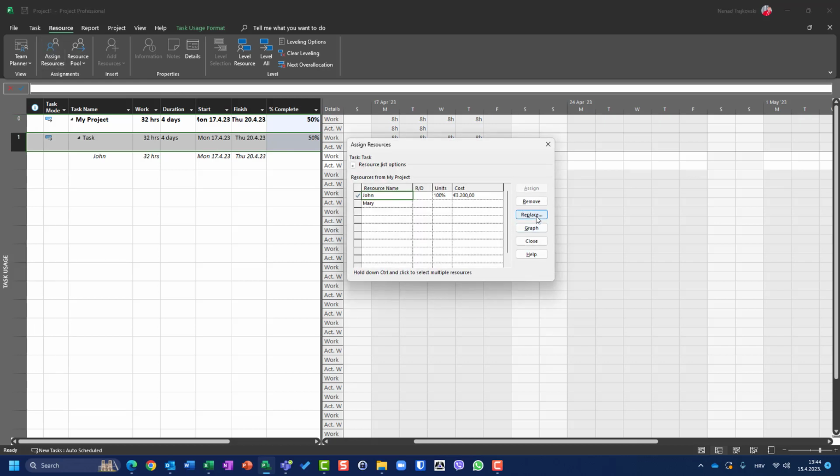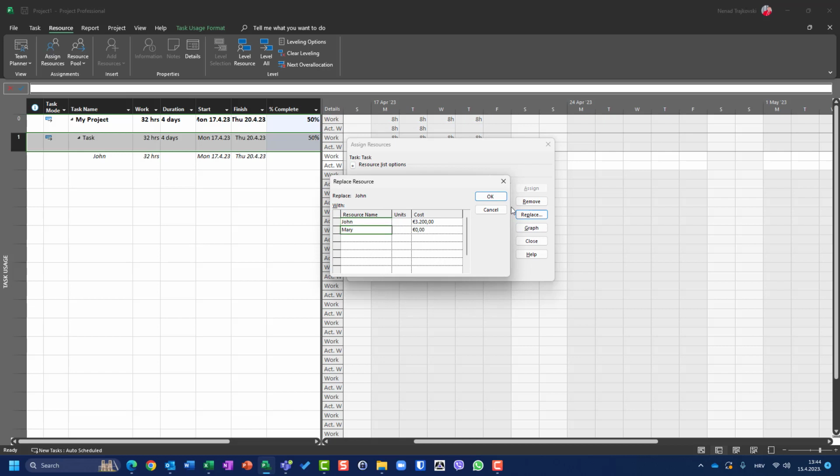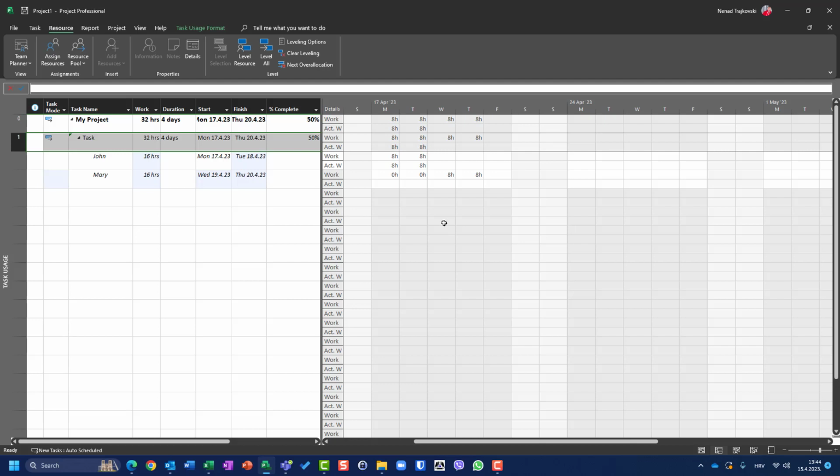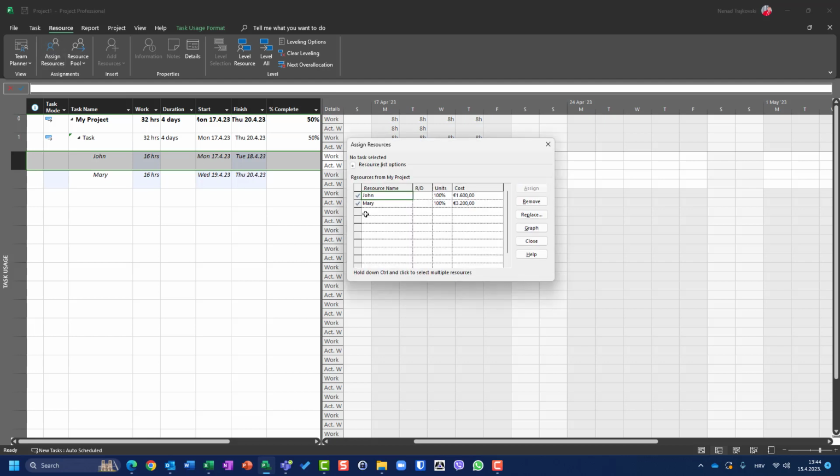I will say, okay, replace John with Mary, and say okay, and close. Now Mary should do the rest of the work. Now I'm going to remove John as well. So Assign Resources, John, remove. Once again, you have the progress.